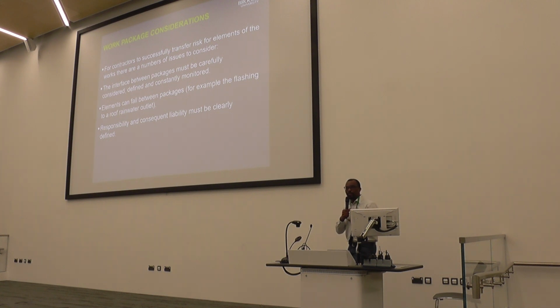But if, for instance, you want to give the first fix of electrical work to subcontractor A, then the actual supply of the electrical fittings to a different supplier, and then the actual fixing of the items to, let's say, subcontractor C, then it introduces a challenge, because you as a project manager will have to coordinate all these people.